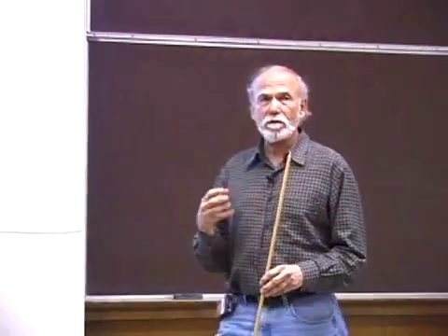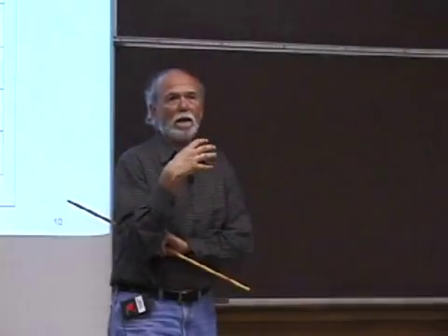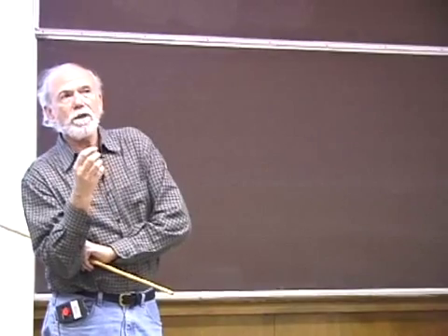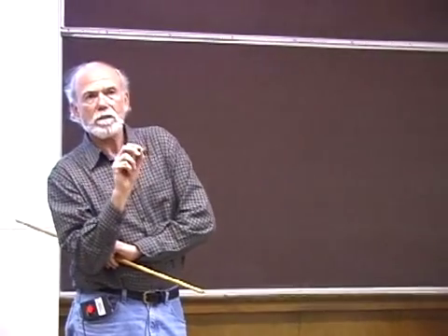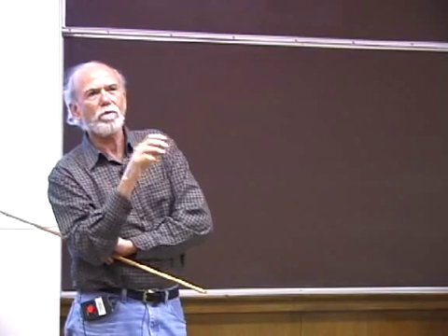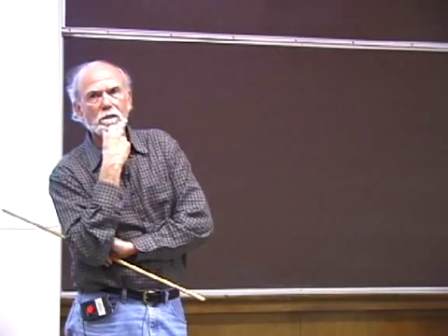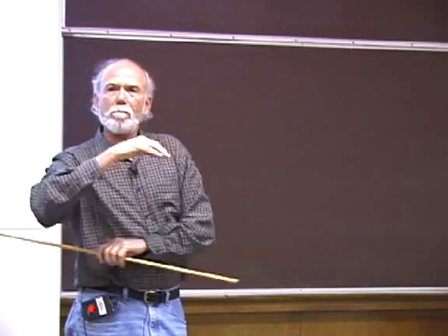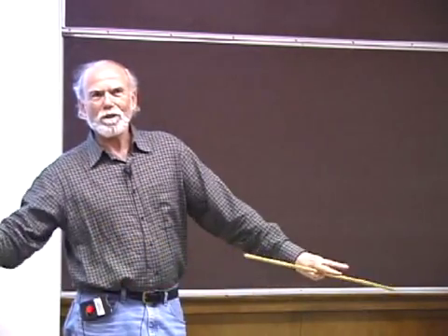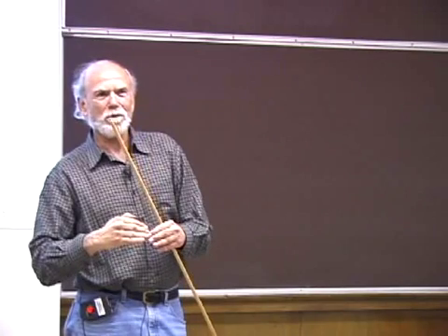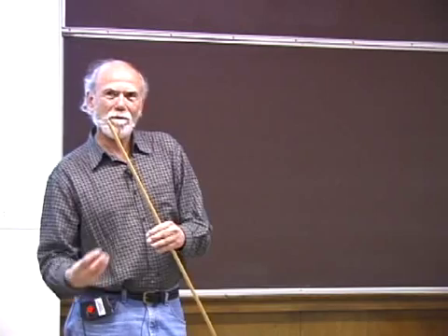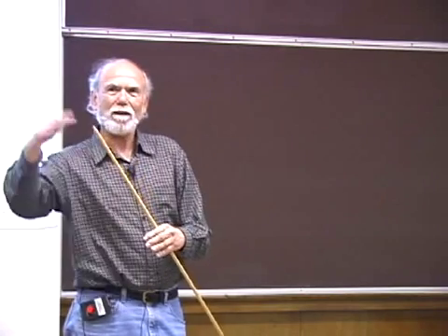I knew to use those numbers because it was the way I had done things in high energy physics, where there have been enough previous projects that we know how well these contingency numbers have worked over a series of projects. I oversimplified it a little in telling you. So you have the best reliable estimate of what all the widgets cost, by knowing how well known those items are and roughly how much contingency each needs.